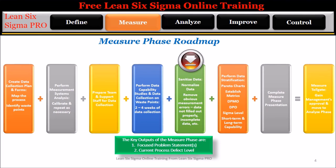Step 5: Sanitize the data — ensure that the data collected is good data. Step 6: Remove obvious measurement errors, data not filled out properly, incomplete data, etc. If the data collected is full of data collection errors, we call this type of data GIGO, which stands for garbage in, garbage out. This type of data should be thrown out. In this case, the team may need to collect more data. This can be avoided by actively checking on the data being collected on a daily basis.